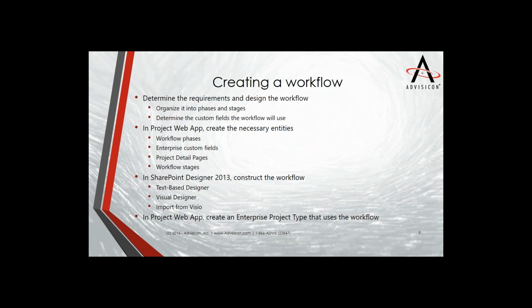And when we're helping clients implement workflows, we go through an interview process in order to gather all of those, and then we diagram the workflow in Visio and go to the next stage, which is determining the custom fields the workflow will use. In this case, you'll see as we get into it that I've created a custom field in Project Online to capture the cost that this proposed project represents.